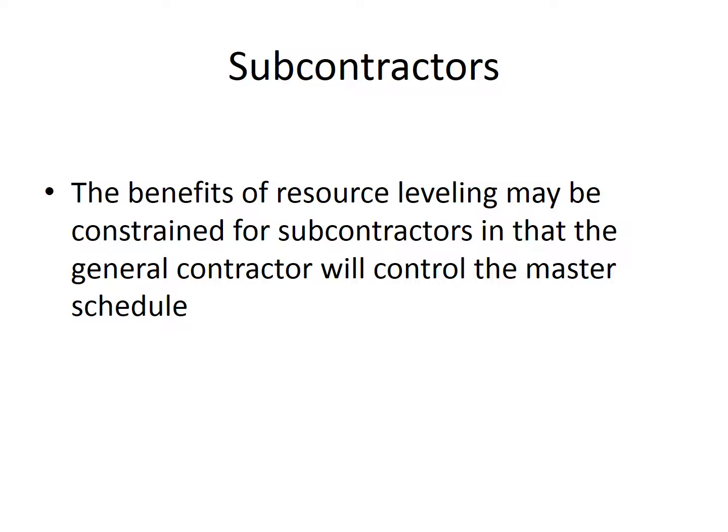With resource leveling, you're kind of limited and constrained for subcontractors, but that's why it's even more important for subcontractors to plan this way. The general contractor basically controls the master schedule, and you are obligated in a certain sense by contract to follow the schedule that was in the contract. So you signed a contract in quadruplicate. It's got a big old schedule attached to it. You're obligated to follow that schedule as best as you're able.